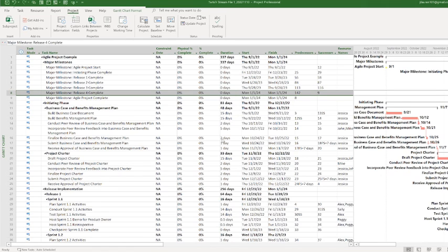But because of that must finish on constraint, it wasn't giving management any idea of the impacts to the latter milestones. And so they got in trouble for that. Long story short, their project wasn't successful. Go figure. But for our example, we are going to try and just use that. Although I think I'm going to put a start no earlier than and just put in, and you can also type it too, 1/2024 and hit OK.